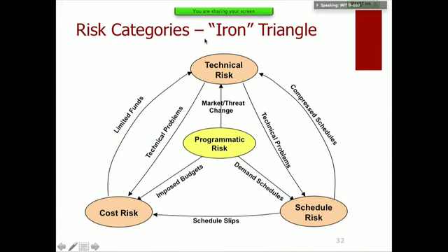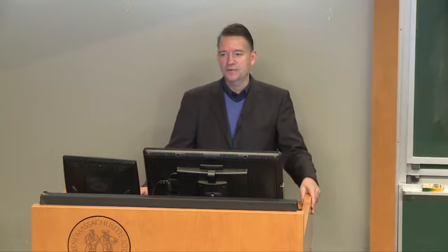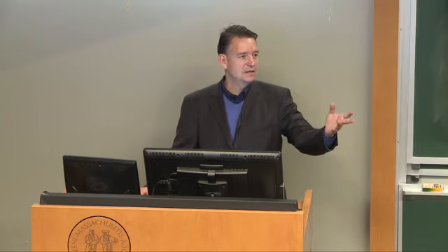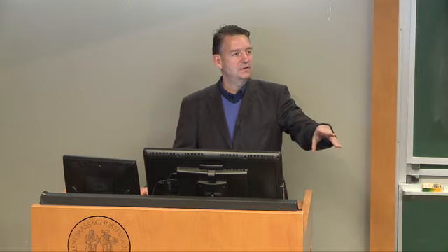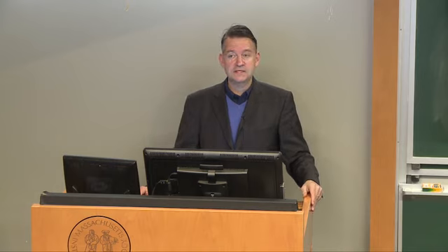The key idea here is that these risk categories are not independent of each other. So let me mention a couple of examples. Cost risk might limit your funds, and that could in itself induce technical problems, which cause you further cost risk. One of the big initiatives at NASA in the 90s was the Faster, Better, Cheaper program, right? We're going to launch more missions, cheaper, and out of 10 missions, maybe 2 or 3 will fail, and then 7 will succeed, but we'll get more value out of this as a portfolio.